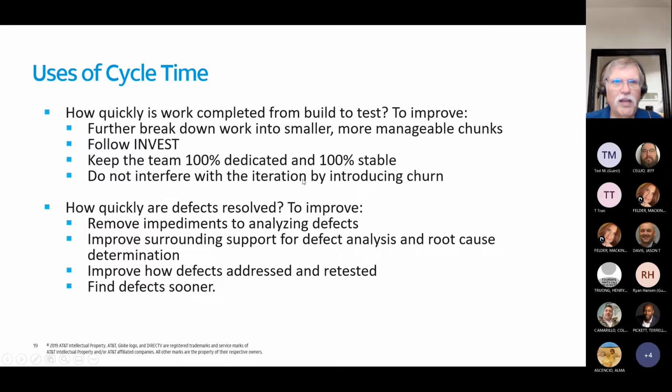Now, when we talk about 100% dedicated, we're not talking 8 or 10 hours a day per person where they're just producing that product. Okay. In software development, we also have a lot of meetings. We have overhead. So the dedication means that they're staying on that particular effort. They're not dividing time between 2 or 3 different efforts. Okay. And that you retain the team members.